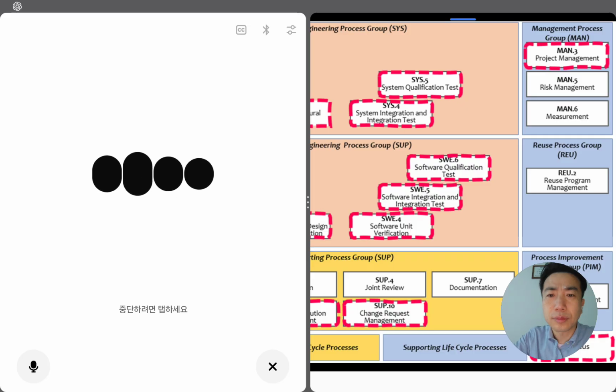Risks are tracked in RSK Tracker with owners and mitigations. Top risks are reviewed bi-weekly. Changes go through CCB, CR023 delayed the SYS, defects from SUP. All decisions and minutes are filed in /meetings with action owners and due dates. Close quote. Quick checklist, you can tick this today.